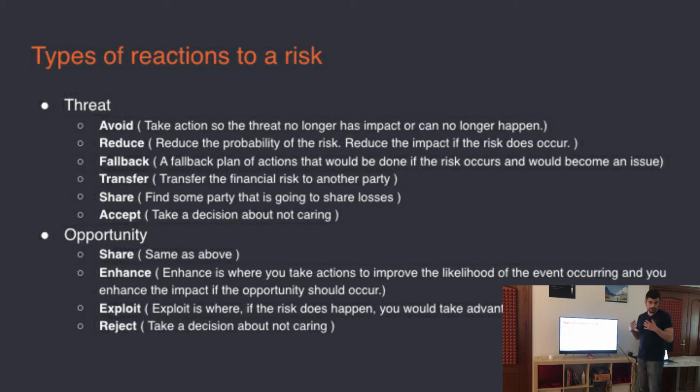And my personal favorite is acceptance. So there is a risk, but no one cares, right? Whatever. But it has to be a very vivid and conscious decision, right? Not caring about risks is not the same as acceptance of risks. Acceptance is that you know it can happen.